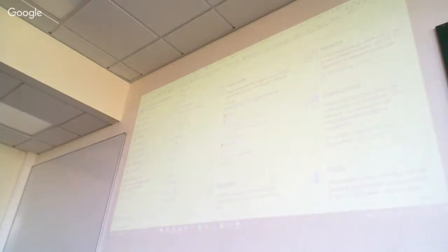I was wondering what the actual task is, because technically everything is a task. Currently, everything goes in as tasks, yes. No, I mean there's a task category. Yes, that's basically everything, all of the above. Usually what companies do is they put tasks under tasks. But if you want to specify what kind of task, and have different names for different tasks, Jira allows you to do that. It just defaults to calling everything a task. Stories have tasks within them, and tasks can have subtasks. Epics can have stories and tasks and things. That's the default.